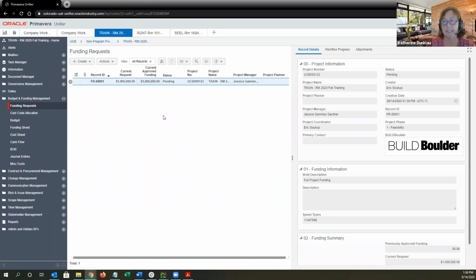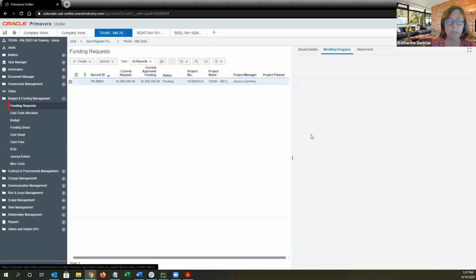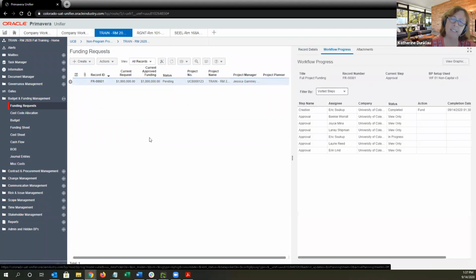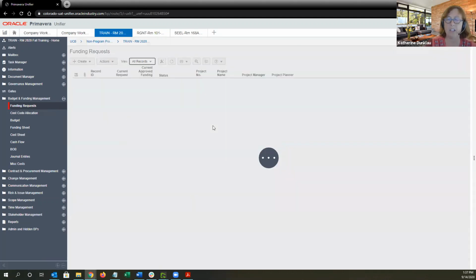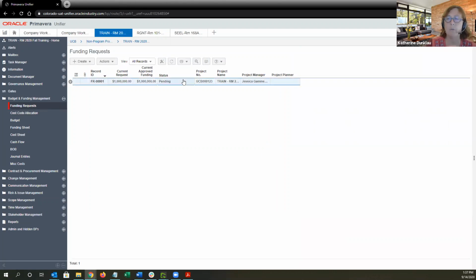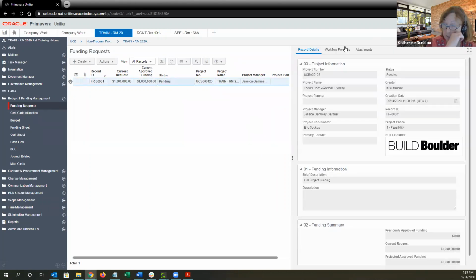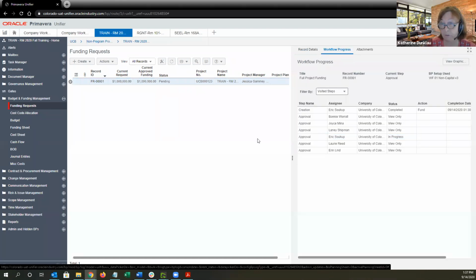So this is consensus approval. This isn't, I send it to 3 people and the first person who grabs it is the only approver. Correct? We fixed that. Yes. I'll double check. For the case where you have a client and a finance person, they're both receiving this email, but it's not sequential. They both will need to approve it. But if the client needs the finance person to approve it first, the finance person can open up the email and copy their client when they're approving it. And then the client will get the second email and go, okay, I can go in and approve now.